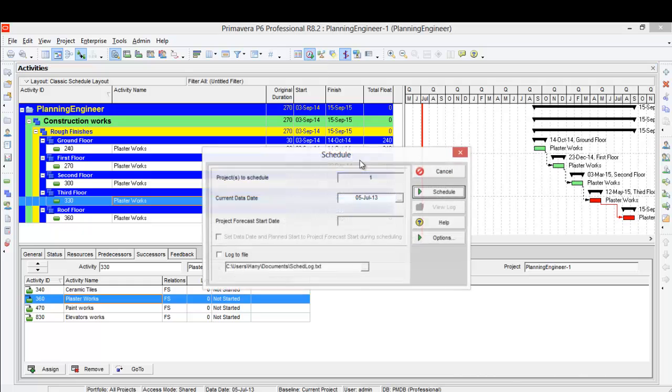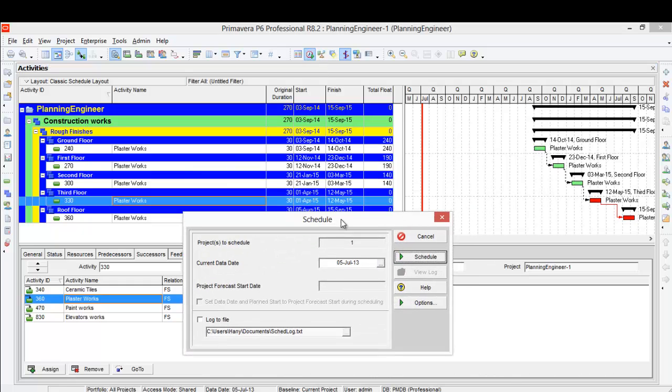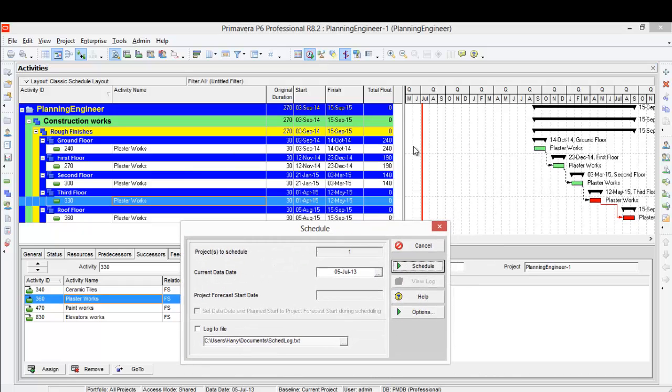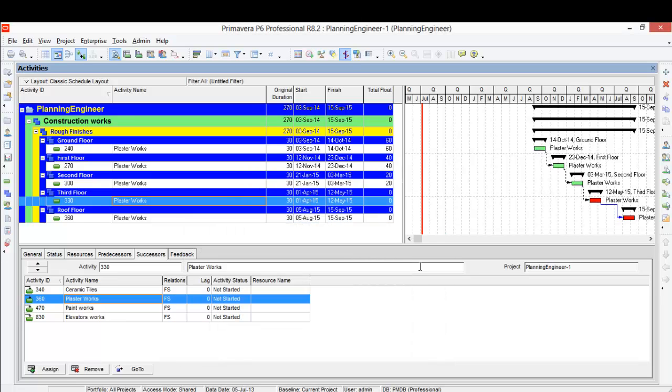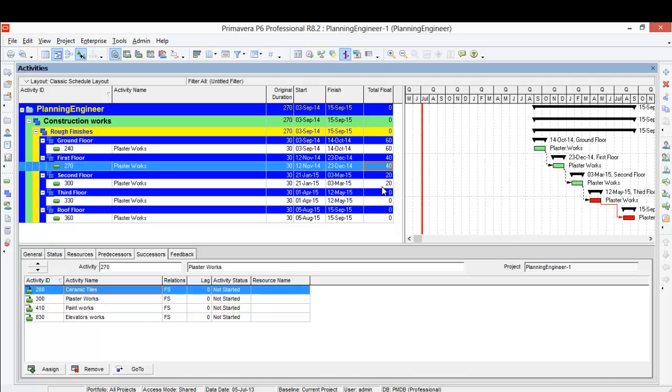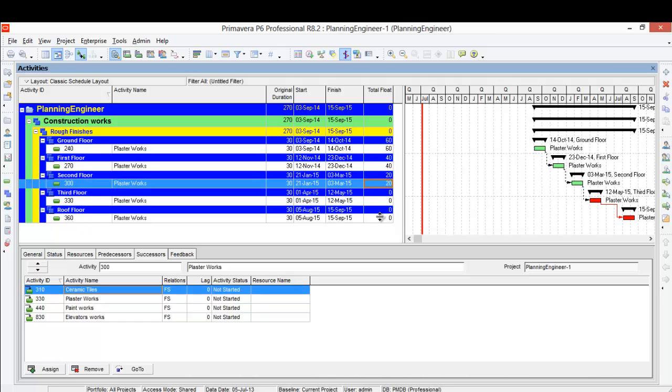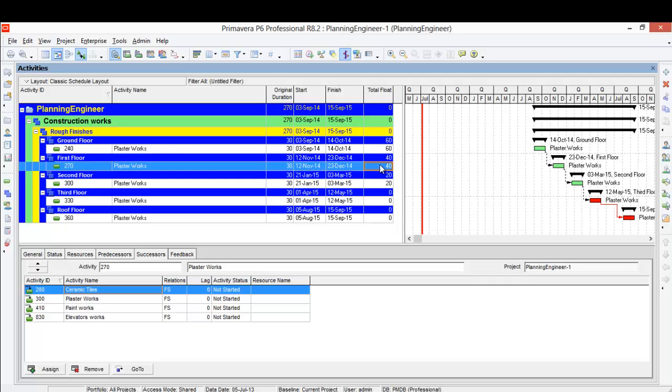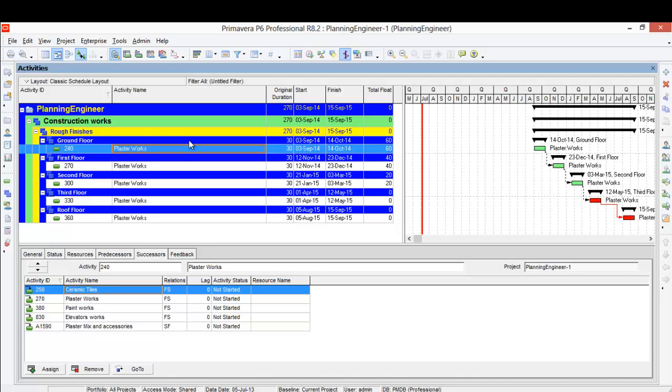And let's run the program. Now notice here this is 240. Let's schedule the project and see if there is change in the project. Now it became 60 days because I added another link to the activity. I told the activity you cannot start in the first floor unless you finish the ground floor. This is a way that you can reduce the total float.